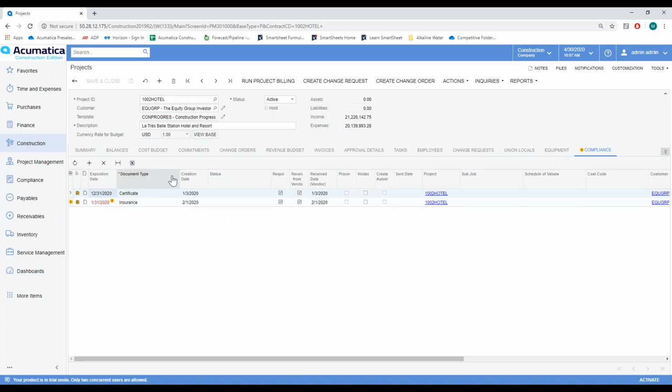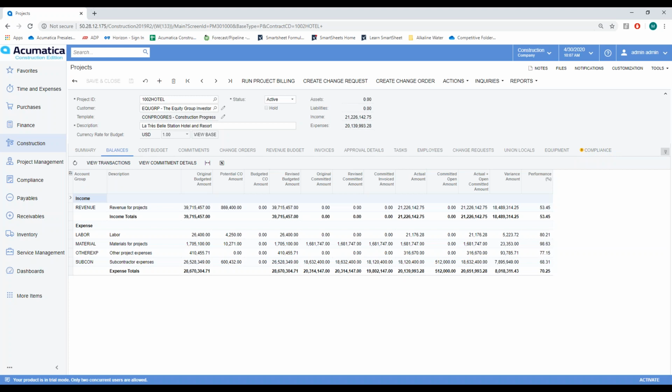But one of the best things about this is actually the fact that I can do some in-depth job costing even right from this project record, no reports necessary. So what I did before for job costing was that I had to wait for weekly reports to be run. And if I wanted more detail, I had to specifically ask for the transaction record associated with a particular cost code or cost group. But now what I'm able to do is get in the project record, get a live look at job cost progress without ever running a report. And now I'm able to do deep investigative dives to see what the costs are comprised of. So let's take a look at this.